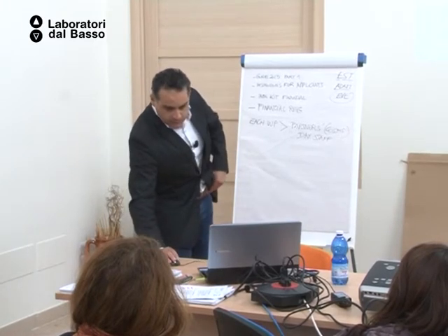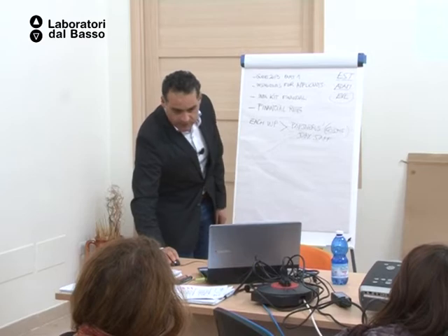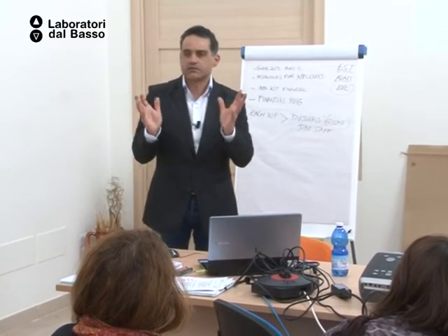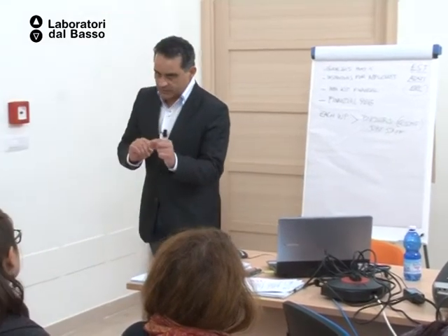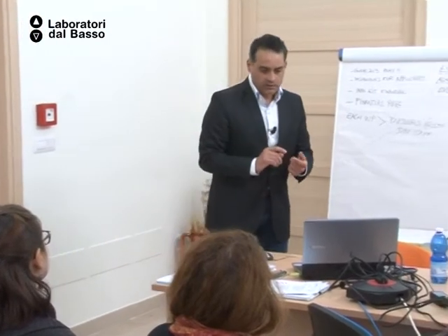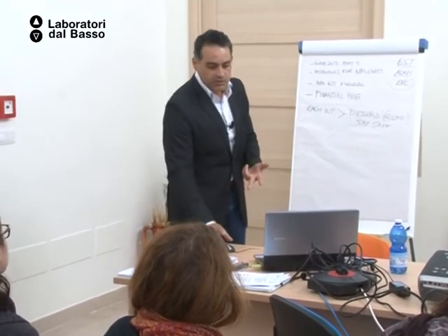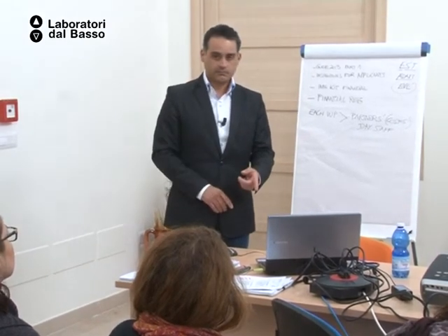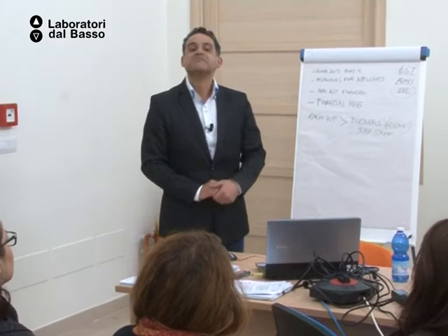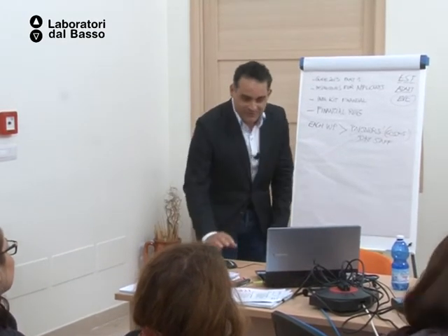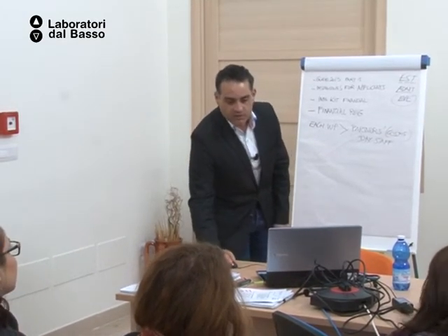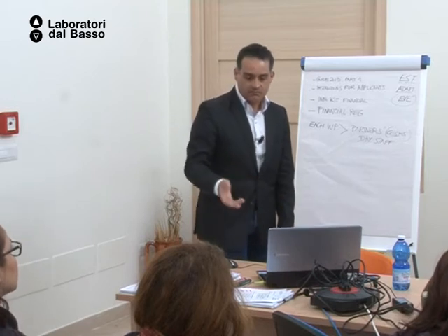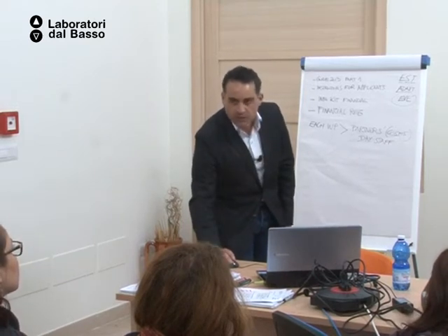At the right part of the tab, you have five main fields of type of activity, which are management, implementation, quality plan. You see quality plan is out of the management? That's why I suggest a special work package for that. Dissemination, exploitation. And then you have these codes, MNGT, IMP, blah, blah, blah.